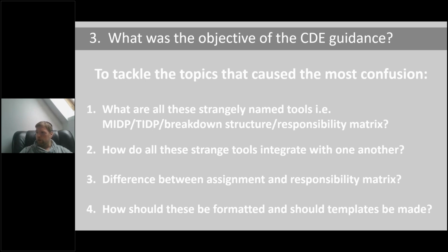Because we've always managed information delivery in some shape, way or form. We've always done it, those in those key areas anyway. So I would always recommend you go back and have a look at what you're doing, because we have noticed that, for example, in my area of expertise, which is design management, when I first joined the industry and started working on the design management side, we had a tool for managing information delivery. We didn't call it an MIDP, we called it an information release schedule. And in that release schedule, we planned out what information we needed from the various parties.